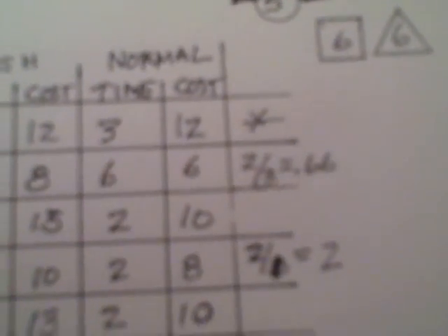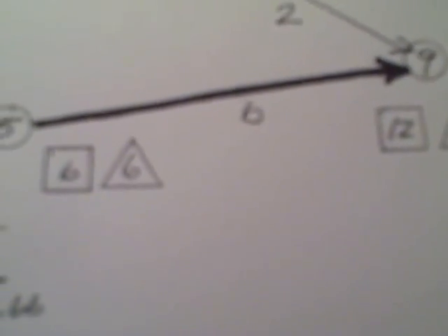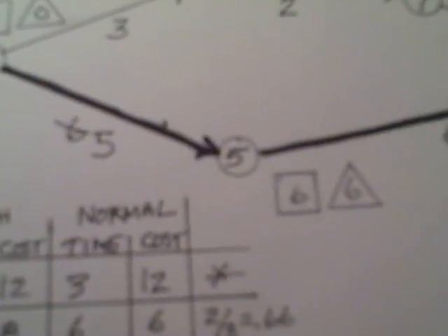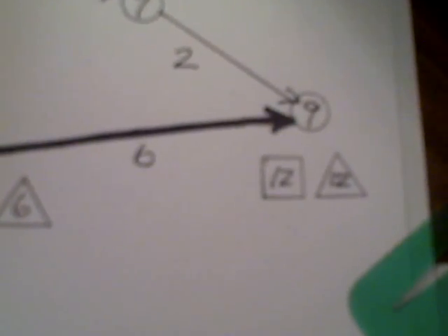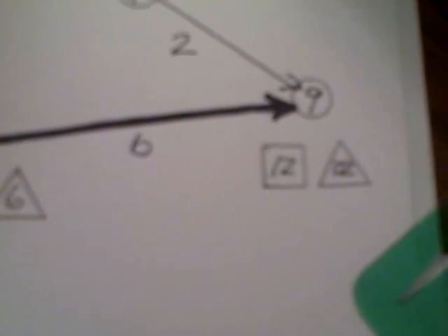So what I'm going to do then is simply choose that activity, and I'll mark it on here. I'm going to choose activity 1.5, which is this activity right here, and I'm going to change that to 5 days instead of 6. And then I need to reschedule the diagram again. I'm not going to reduce it further now, but typically we do these schedule reductions for many more than just 1 day. We'll do it maybe all the way until it can't be done any further, so we have all the alternatives identified. But for this little example I'm giving you, I'm just doing it for 1 day.